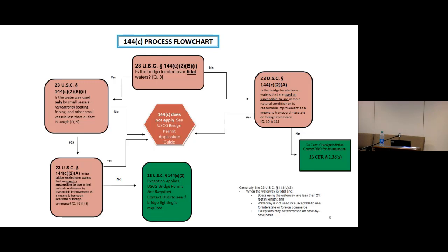You would think the answer to that one would be no, because again, this is a pedestrian bridge, non-tidal waterway. But, believe it or not, the state, I want to say, was it Montana or Wyoming? At any rate, the state that adjoins on that waterway, they were actually running jet boats for hire, carrying passengers for hire on that waterway, and it actually met another waterway that was a conduit for interstate commerce.